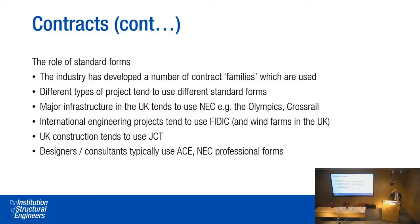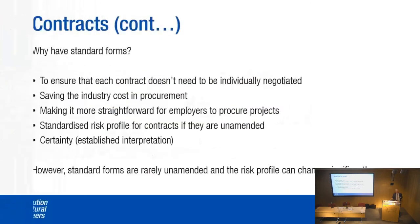Designers, consultants, and structural engineers will typically use, if using a standard form, the ACE or the NEC professional forms. These are quite useful forms. The ACE does a short form, which is a very simple form to use, and it does bring discipline to make sure you include some of the very important provisions that you need in your contract.